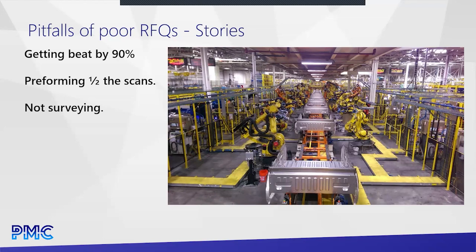And so then, lastly, the number one issue we see is people trying to do jobs that are too large and they're not doing that secondary survey. We see this all the time. I would say at least once a month, we get contacted by someone hoping we can fix a job where this is what happened. They just try to do something too large without doing that secondary survey control. And I understand why. I understand the drive to do this.